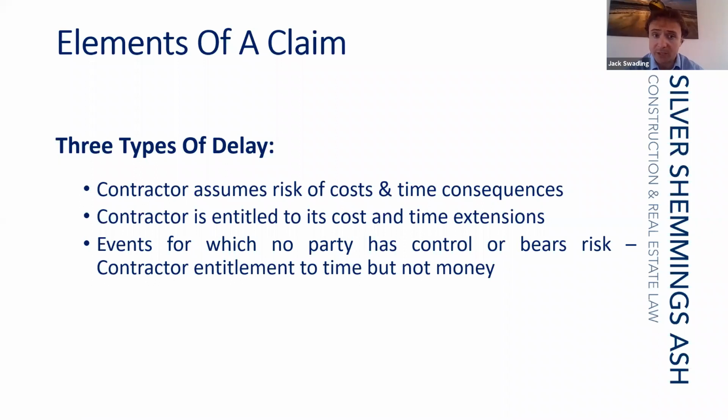And third of all, there are the neutral events. So these are events which neither party is held to bear the risk, and the contractor has an entitlement to time, so it's a relevant event, but not money, so it's not a relevant matter.